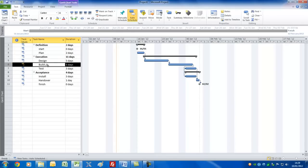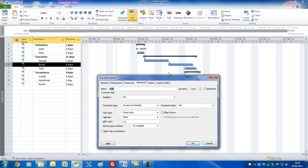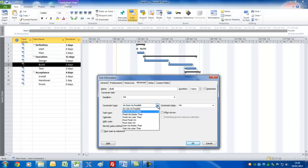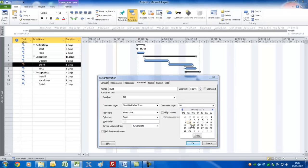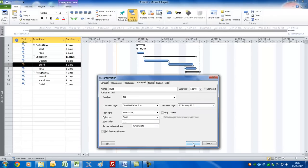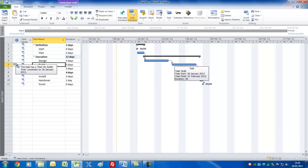For the Build task, let's say you need to wait until some materials are delivered — it's an external dependency on the 26th of January. So let's put a 'Start No Earlier Than' constraint on the 26th, just to show that you won't have the materials to start building until then. Press OK. You can now see a one-day delay here, and you'll get a little symbol indicating this task has a 'Start No Earlier Than' constraint.